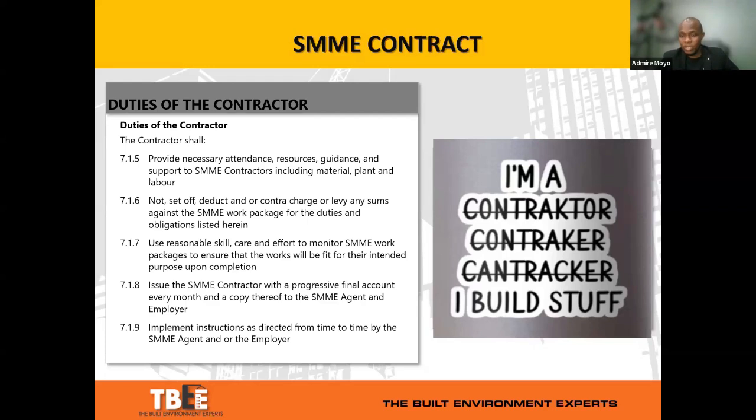In the mind of the SMME contractor, and I'm not generalizing, I'm just talking from experience, he has to pocket 1 million. So there are instances where, for example, the design team omits a certain section of brickwork, and that 1 million suddenly becomes 800,000. You've got problems there, because as an SMME, I want my 1 million, and it's non-negotiable and so on.